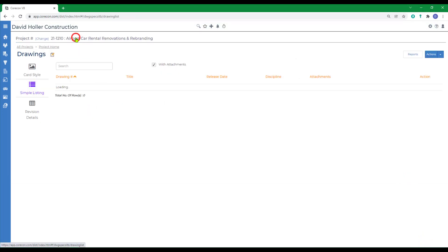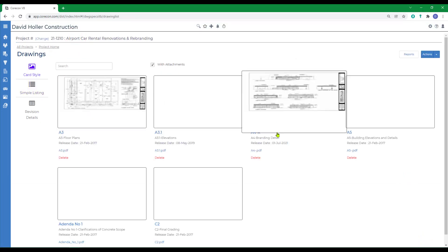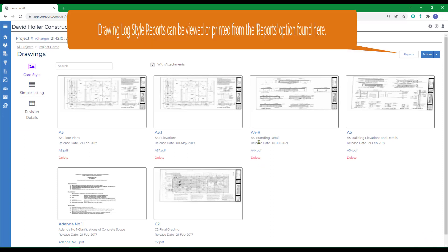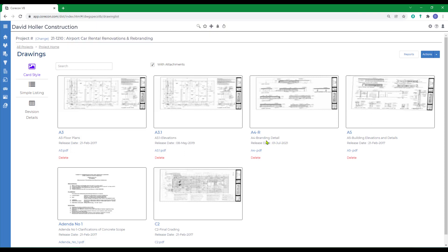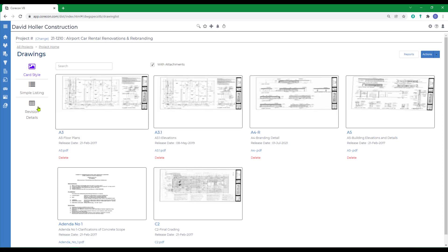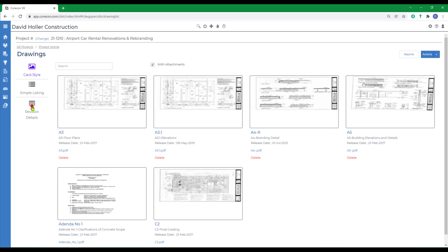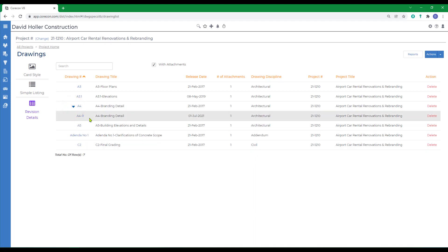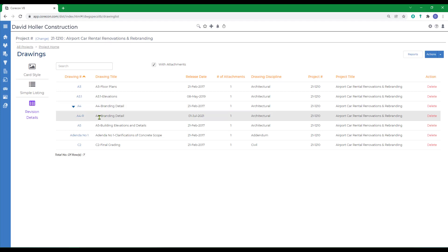If we go back to the drawing list, we're going to now see that the currently visible version of this drawing is the A4-R representing the revised version. If we go back over to the revision detail, we can now see that the most current version is the A4-R. The A4 version is not deleted. It will remain in CoreCon as part of the permanent record, but suppliers and subcontractors are only going to be able to see the A4-R, which is the most current revision.